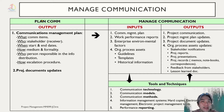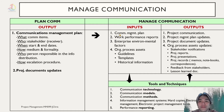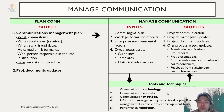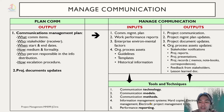The output from plan communication becomes the input for manage communication, which includes the communication management plan and work performance report. The inputs also include enterprise environmental factors and organizational process assets. The tools and techniques used are communication technology, communication models, communication methods, information management systems such as hard copies or electronics, and performance reporting.